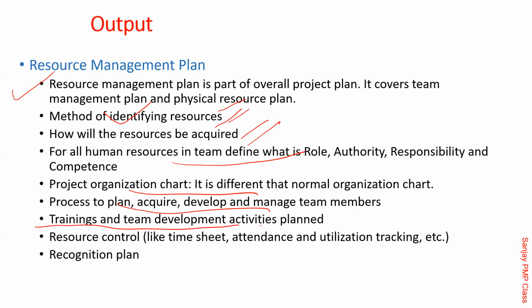What trainings will be given to the team? It is possible that you might deliver training yourself, or your team lead will deliver it. In some situations, you would have already created the knowledge base in the form of a PPT and tell people that within the first 3 days they should finish it and take this small test. Whatever your methods, you need to document them in your plan. Resource controls: will they fill in timesheets? Does everyone need to report to the office every day, or 3 days in a week, whatever.